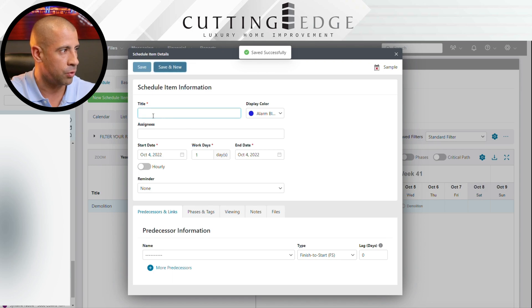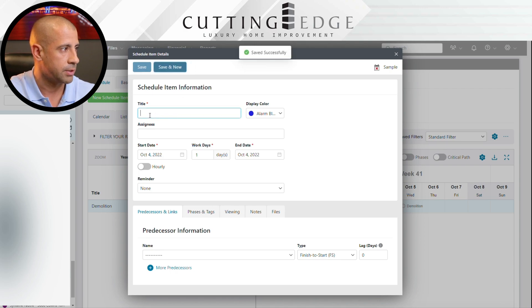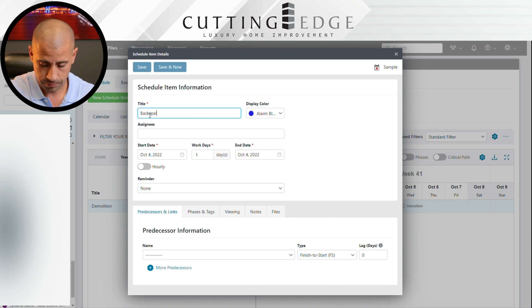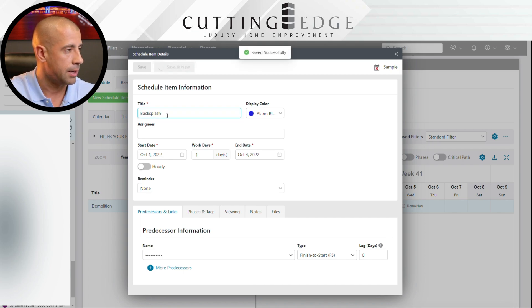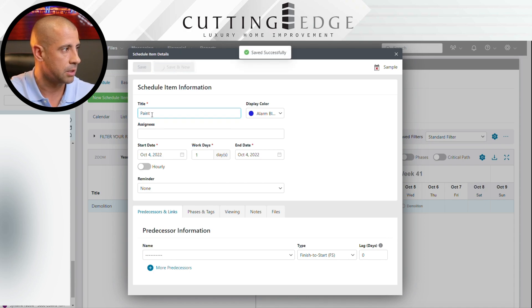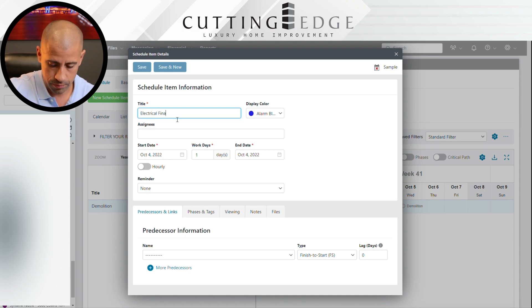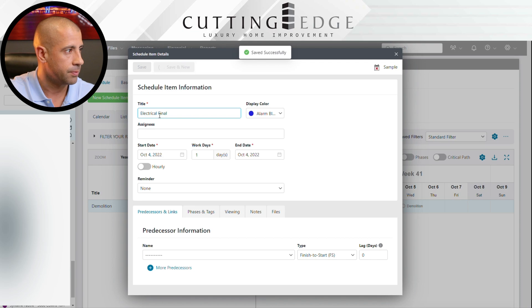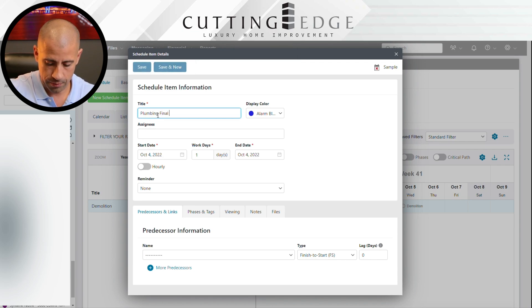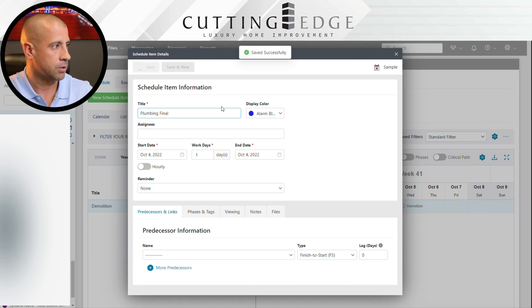I'm writing each activity because each one gets done by a different crew. You're not going to have the plumber doing countertops — if you do, you're going to have a disaster project. We're going to need tiling, floor tiling, backsplash for the kitchen, painting, electrical final, plumbing final, and so forth. You can always come back and add more activities, but for now we'll stop there.